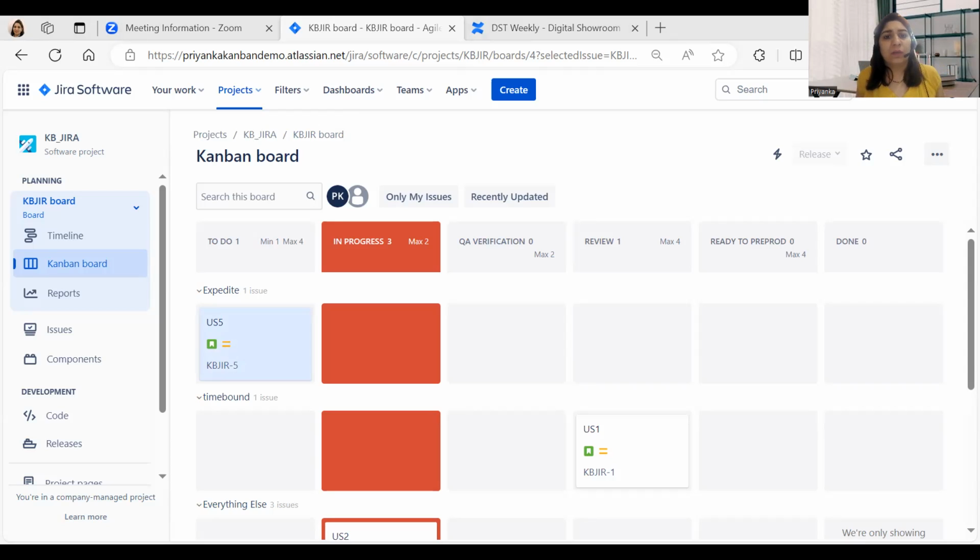There's no thumb rule, but as a starting point, what you can do is assign WIP limits based on the number of people working in the team. So if there are 2 reviewers, give 2 as the WIP limit for review, and see if this works for you.